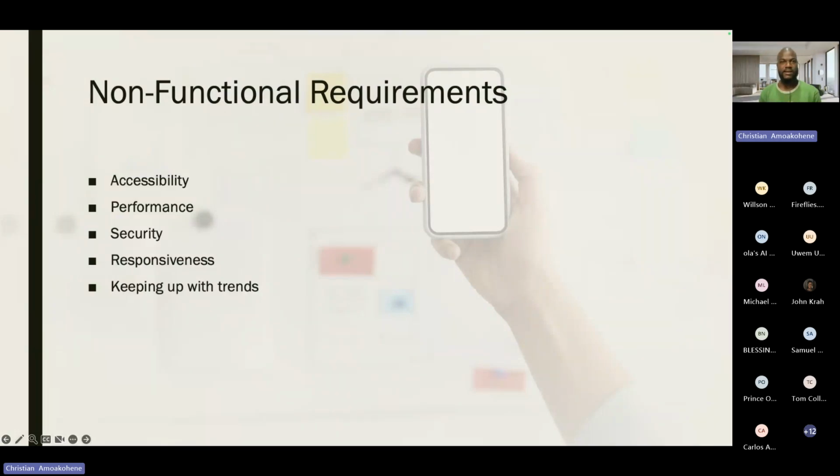These things are sometimes, in fact all the time, not captured in your PBIs, but a very well-functioning Scrum team would make sure that, if your PM is aware of non-functional requirements like this, they add them to their definition of done, and we put it on the board as not done if it doesn't meet any of these requirements. And there is the aspect of security.